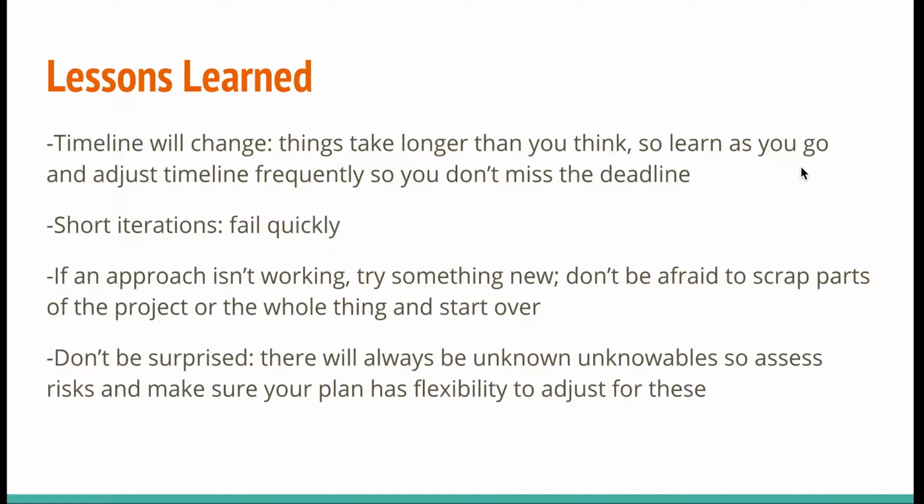I think that I needed to make sure that I was going in and readjusting my plan more frequently, and also allowing for more flexibility in my plan. I had it so thoroughly planned out at the very beginning, where I had so many steps worked out and had done a ton of, okay, this is how I'm approaching it, this is how I'm going to organize everything. And it was more of a waterfall approach than a sprint, where I was doing a lot of thorough